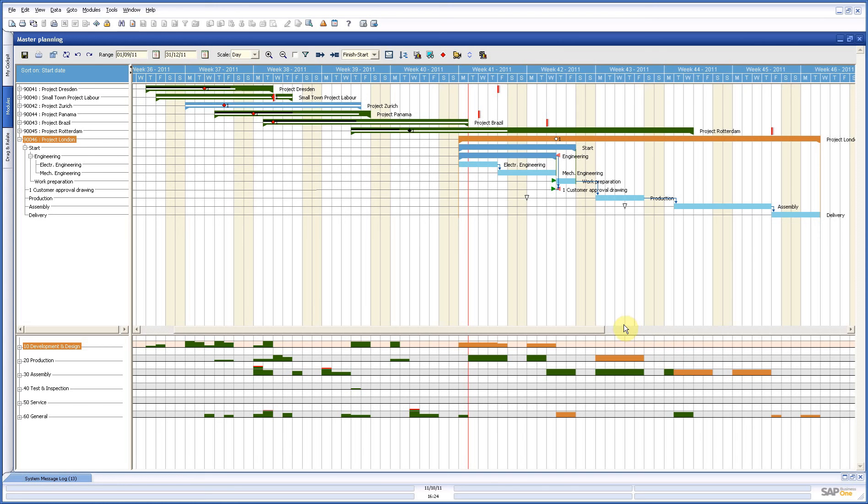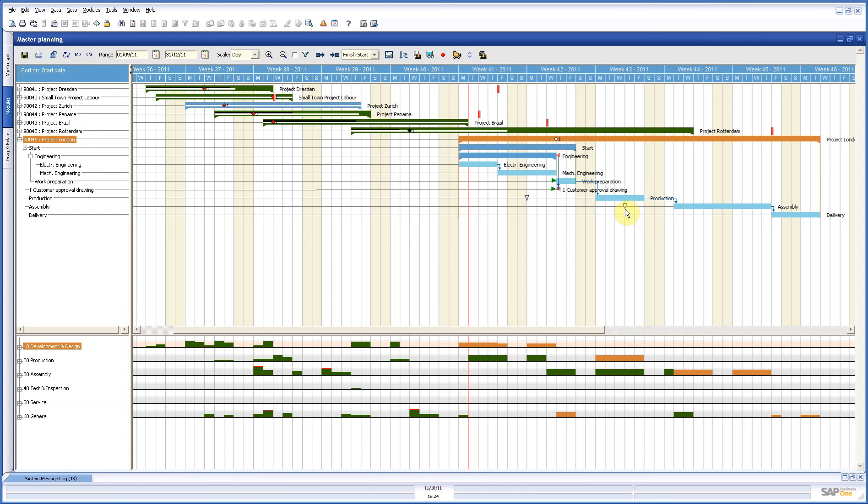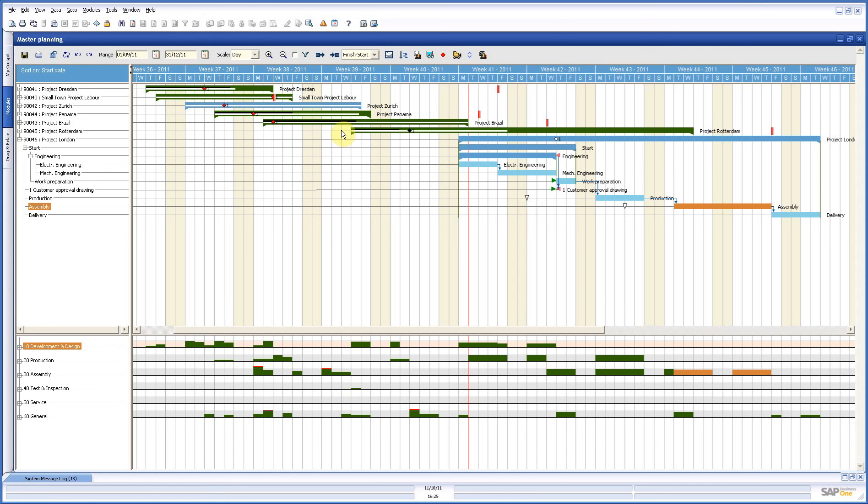Another thing I see here are those white triangles, and those white triangles refer to the materials I need for these two specific activities. And these say you need to order at least here or start producing, otherwise you are too late to start this activity with your material. In this case, they are both white, so we have no problem. If they are turned to the left of this red line, they turn red and you can have an alert and you have to see what to do about it.